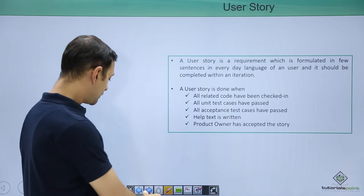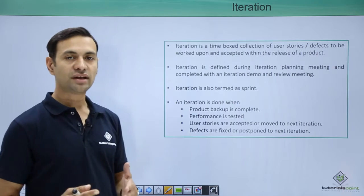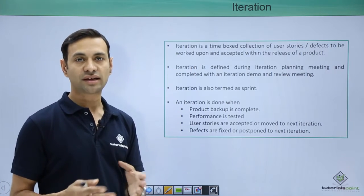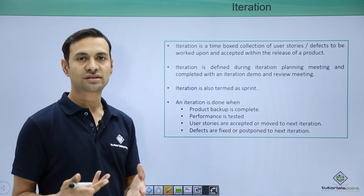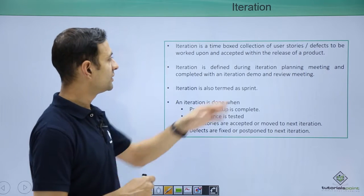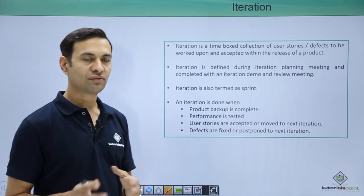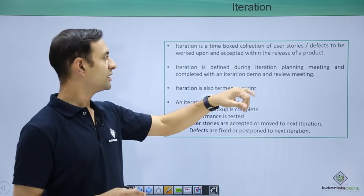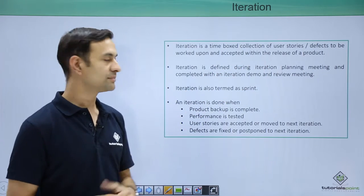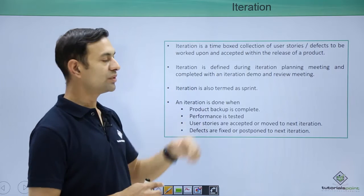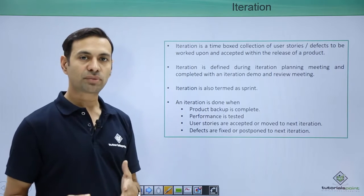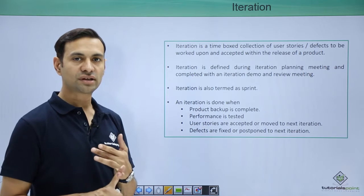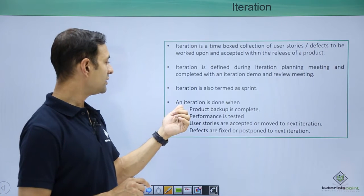Next is iteration. Let's see how to check whether an iteration is complete or not. An iteration is a time-boxed collection of user stories — normally 3 or 4 user stories or defects — which are to be fixed within a particular time frame so that our product gets released.